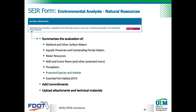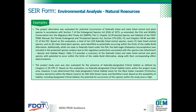The natural resources section includes subsections for wetlands, protected species, and other natural resources, where you also upload the natural resources evaluation and coordination or concurrence letters with the resource agencies. An example of information included in the protected species and habitat subsection states that the project was evaluated for potential occurrences of federally listed and state listed animal and plant species, includes the result of the evaluation and references a map and a table, and includes the determination that there were no federally designated critical habitat in the project study area.